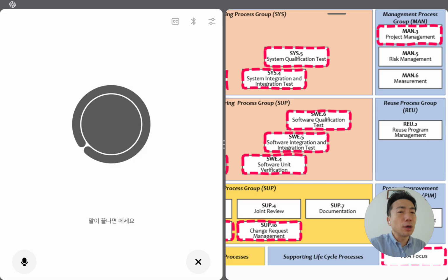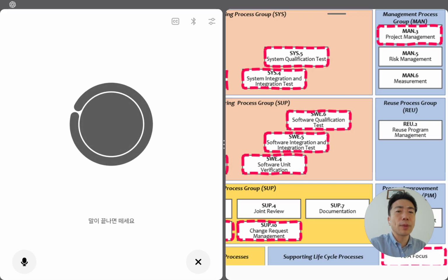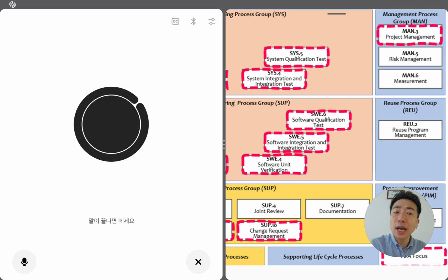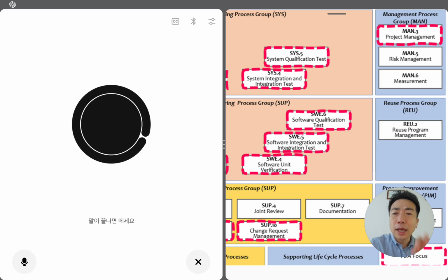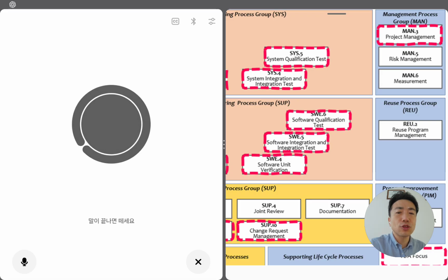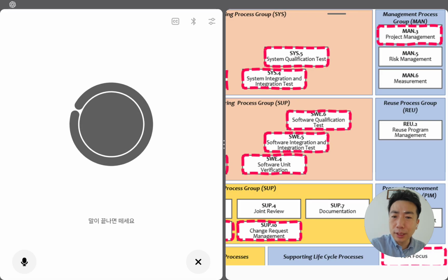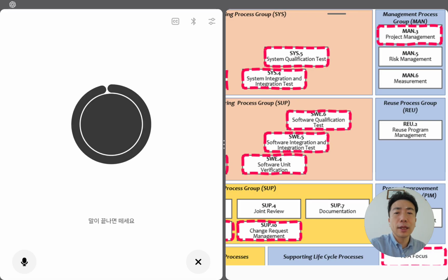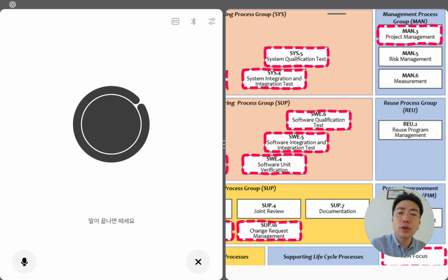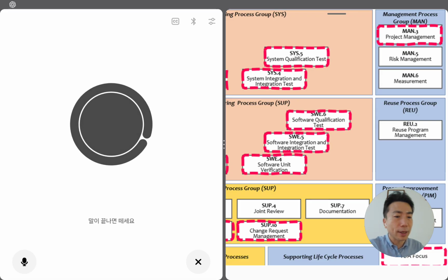Okay. If someone wants to change anything after a baseline, they must raise a change request, CR, and get approval from the CCB. The CCB reviews what's changing, why it's needed, and how it affects cost, schedule, and quality before approving.